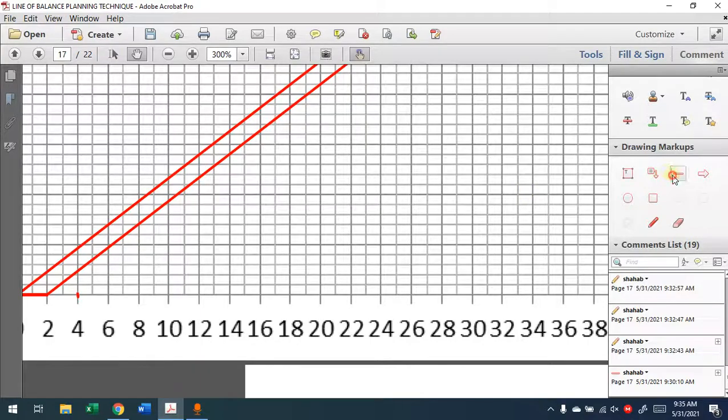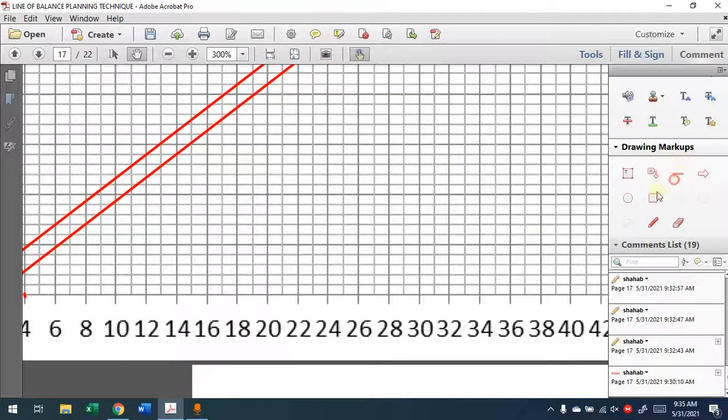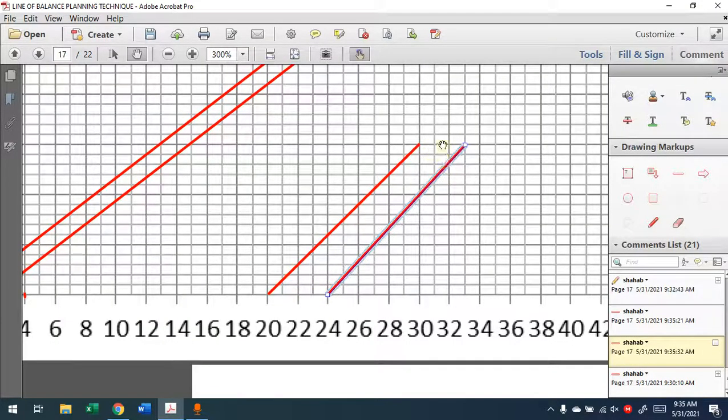What do I mean by this? Imagine this is a line. If I have another activity with a similar rate of build, what will happen? Exactly, it will be parallel, yes? Now, let's say we provide how many days between them? 1, 2, 3, 4 days. If they have the same rate of build, if 4 days at the bottom, 4 days will be at the top. If the rate of build is less than, look, it will be more horizontal, yes? At the bottom you have 4 days, at the top you have more than 4 days.